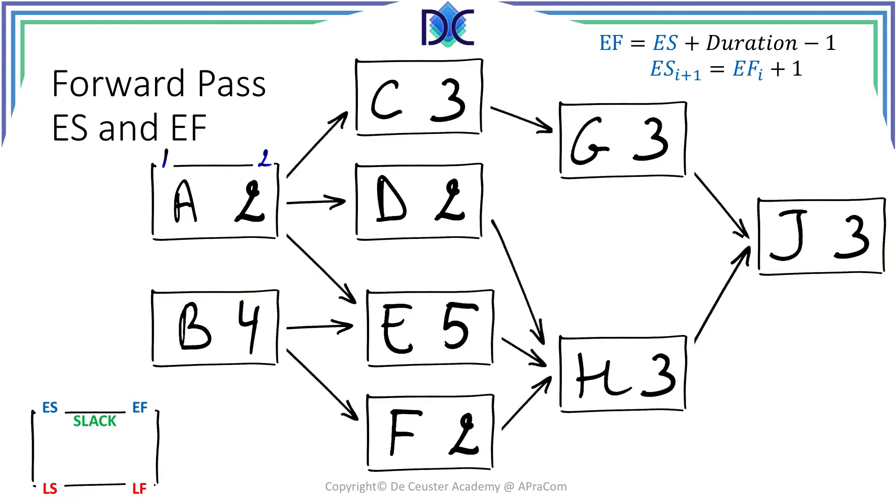The next thing is to look at the successor. C is a successor of activity A and C can only start when A is finished. Since A finishes at the end of the working day of April the second, C can only start in the morning of April the third. Again, counting three days means that activity C will finish in the evening of April the fifth.